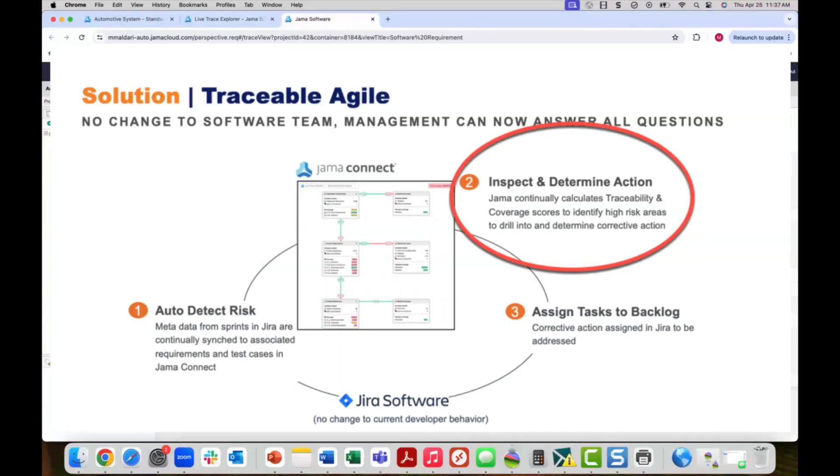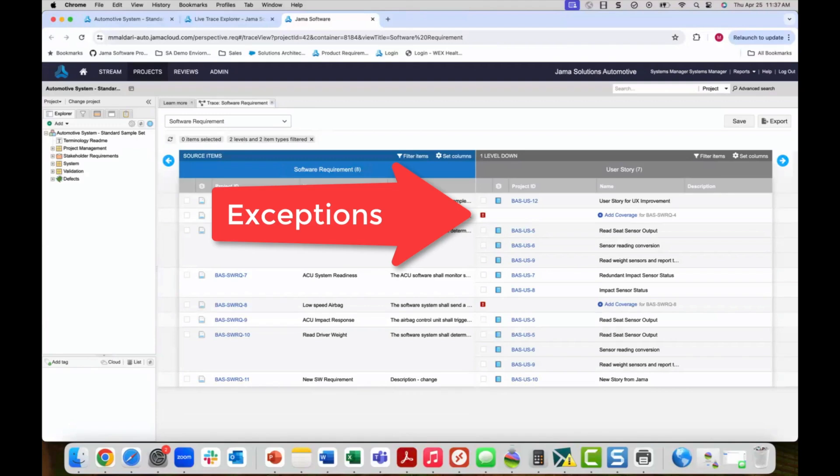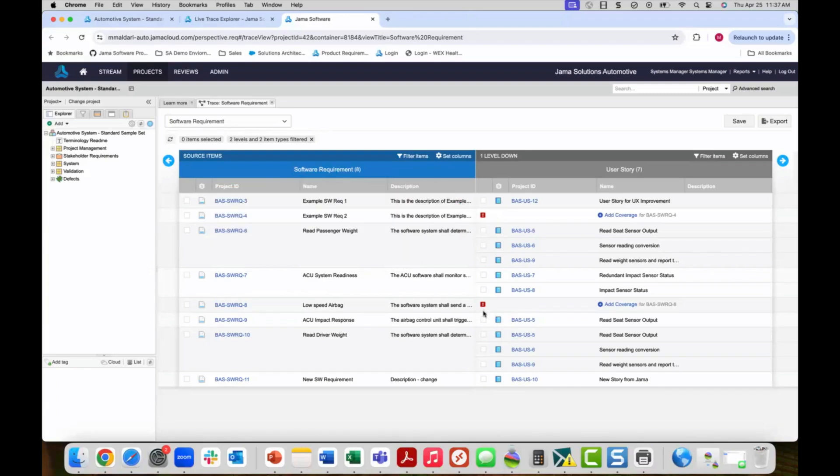Step two of traceable agile is to inspect exceptions and determine action. Management can easily view issues and assign tasks to engineers to remedy gaps that are discovered. I can see that there are multiple exceptions being tracked where a software requirement has no downstream user stories. This is something that I have defined as a must-have relationship in my trace model and is now being flagged.